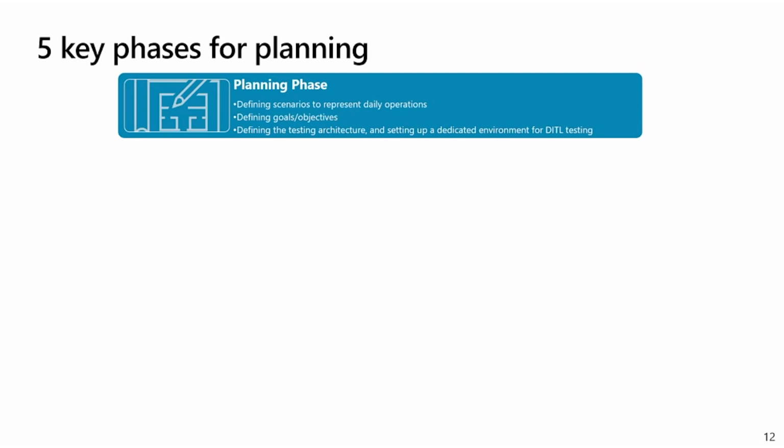And then we need to define the testing architecture. After you have the discussion with the team, you should understand what day in the live operation you need to simulate in the day in the live testing. And then you should start to think about the testing architecture and approach from the testing perspective, what tools you should use, and any help from the customer. Maybe you need the customer to provide the data pattern in the transactional data, or maybe the integration testing endpoint setup. So you should think about the final architecture in testing for the day in the live testing.